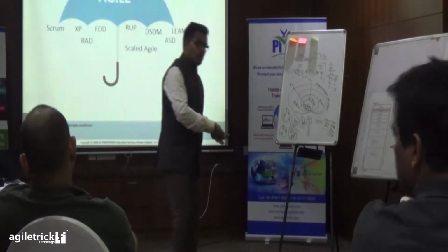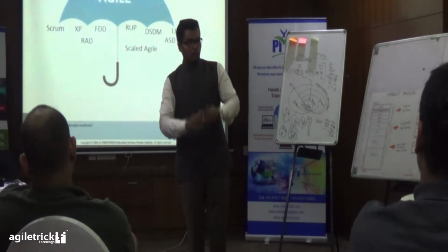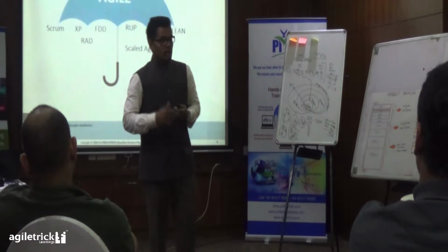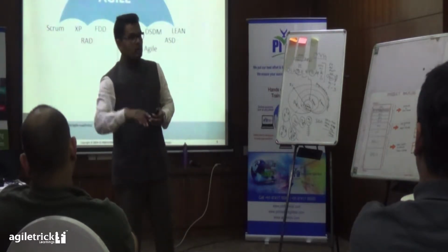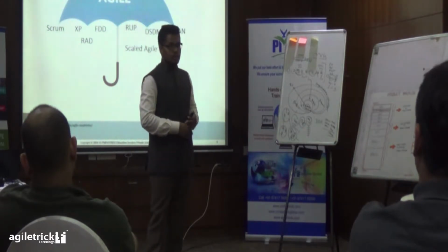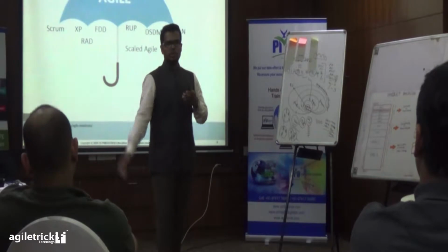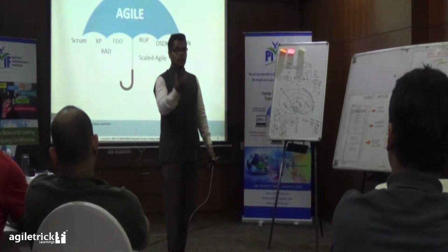Then it will go to our PMO head. The PMO head will approve it. Then it will go to the business, the customer PMO. He will approve it. Then it will go to the other stakeholders. Finally, once they approve, the CR is approved. One mail will be sent to me. Once the CR is approved, I get confirmation that the schedule change, cost change, finance change, everything I requested is done.